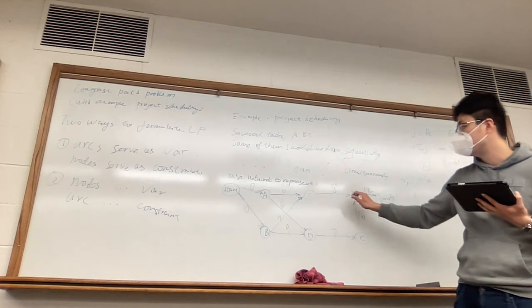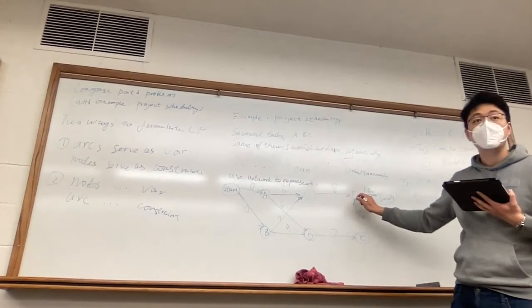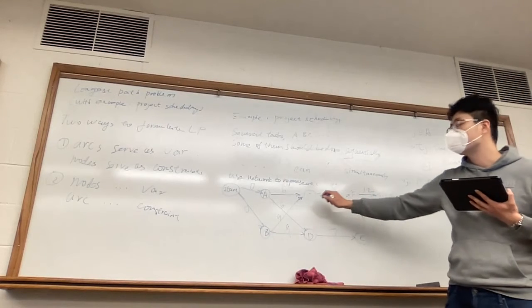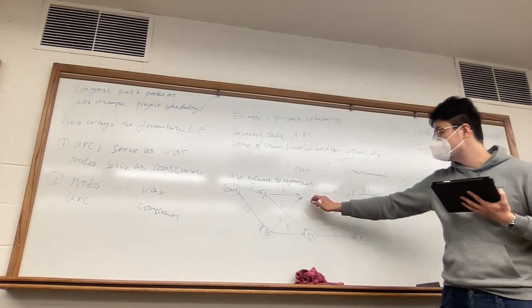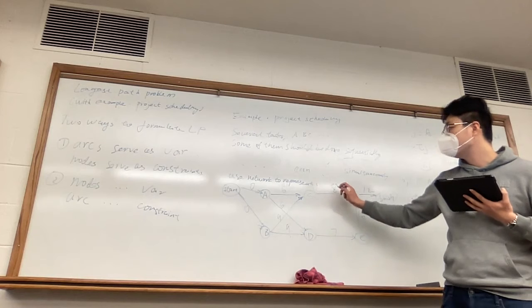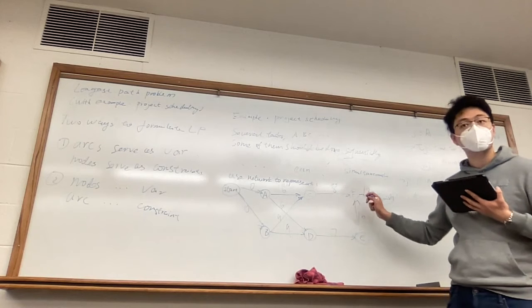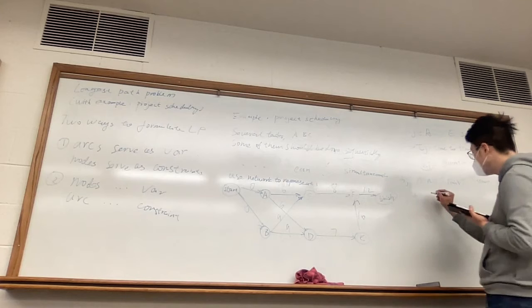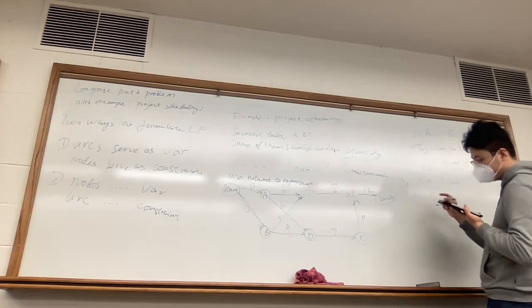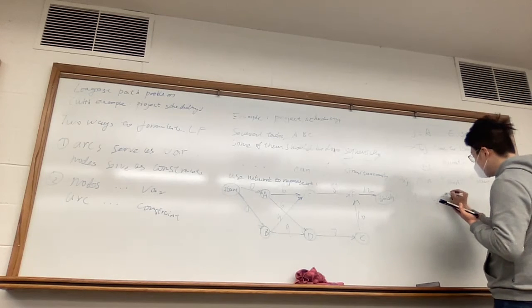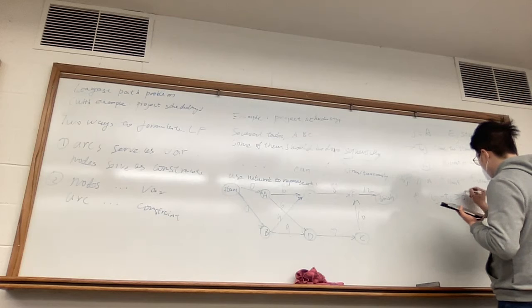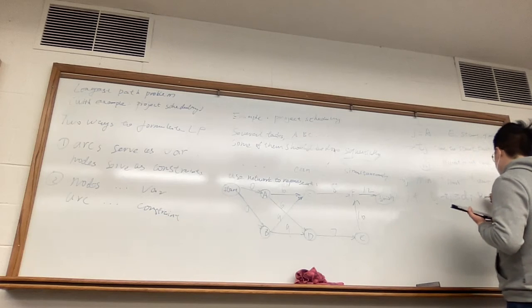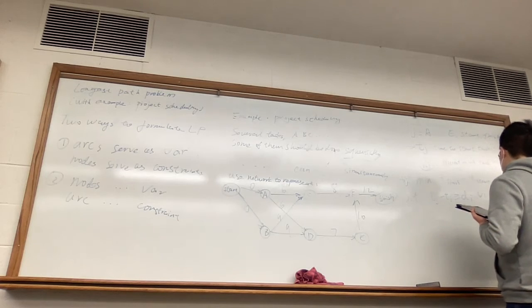This is the earliest time that we can start task F because task F has prerequisite C. You need to start C and complete it in 8 hours, and then you can start F. So this is the earliest time of F. So the constraint is that Tj minus Ti is greater than or equal to Di for any ij in the network.